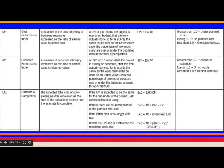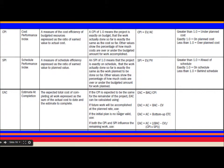Estimate at Completion (EAC) is the expected total cost of completing all work, expressed as the sum of actual cost to date and estimate to complete. There are four formulas for EAC: (1) EAC = BAC / CPI — use when CPI is expected to remain the same. (2) Use if future work will be accomplished at the planned rate. (3) Use if the initial plan is no longer valid. (4) Use if both CPI and SPI influence the remaining work.